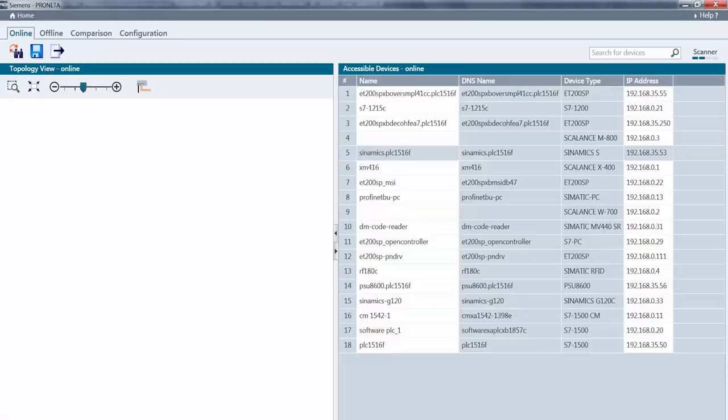The IP address is now set for the CPU. As we can see, PRONETA set all the associated devices to the 35 range once the start address for the CPU had been entered. This aligns the entire machine and the entire I/O system with the customer's IP range.